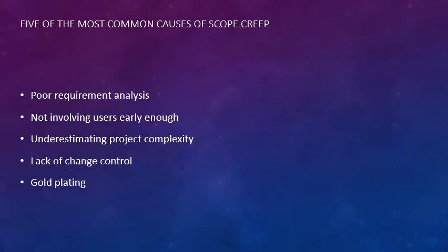Understanding the project complexity. Maybe we don't really understand how hard it is to do what we're doing, and that could be based on the organization, their level of engagement in the project, or just in terms of how technical the project is, might be higher than what they are currently able to complete or do. So now we need to have extra resources to train people, to put manuals together, or to simplify processes maybe and give short keys.